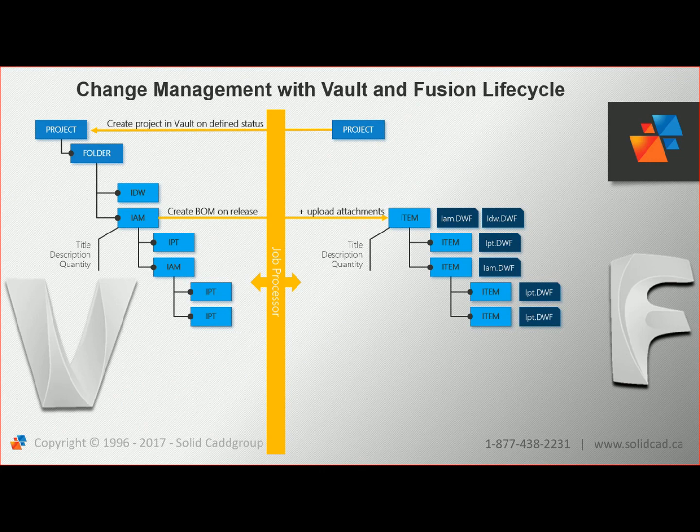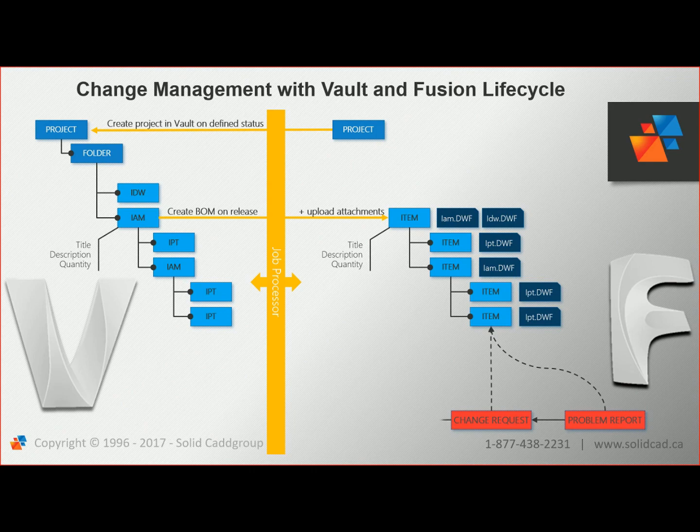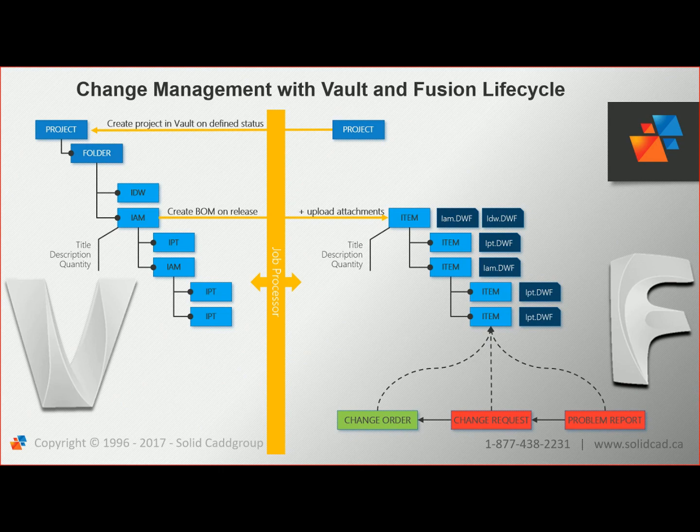At a future point in time, someone may recognize a problem with an item in the Bill of Materials and wants to initiate a change. In Fusion Lifecycle, they can log a problem report. The problem report flows through a structured workflow, becoming an engineering change request, and then an engineering change order.